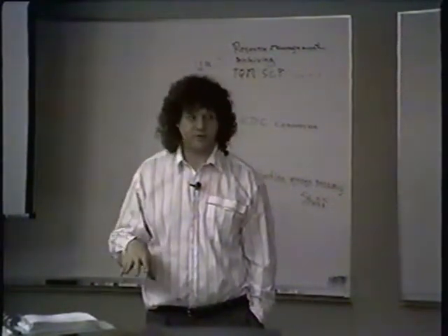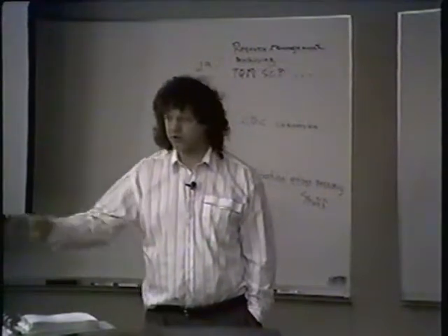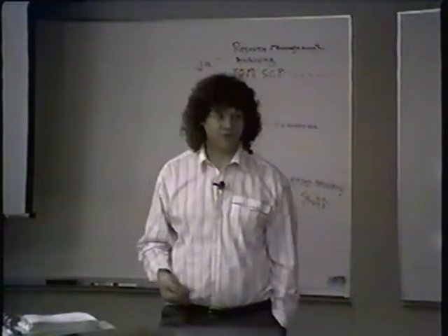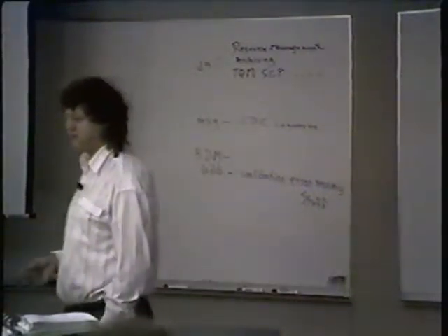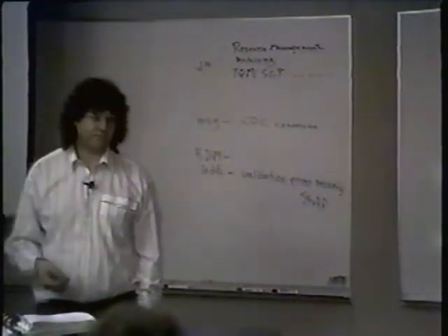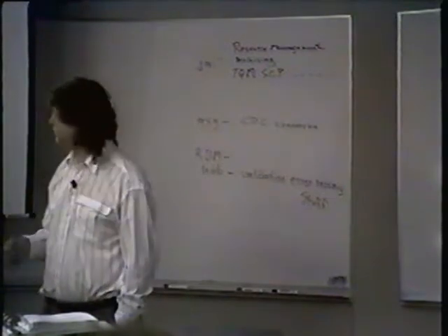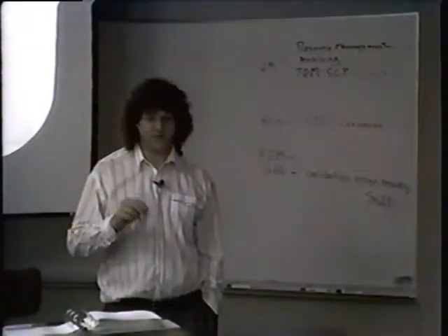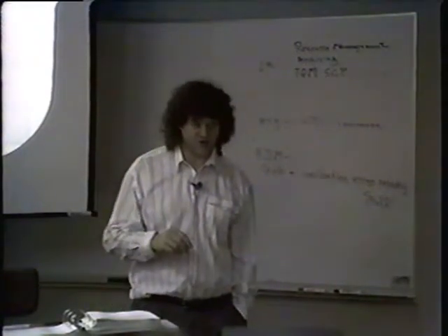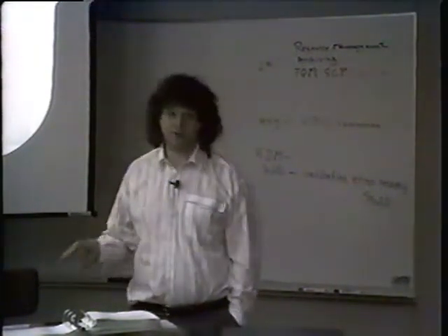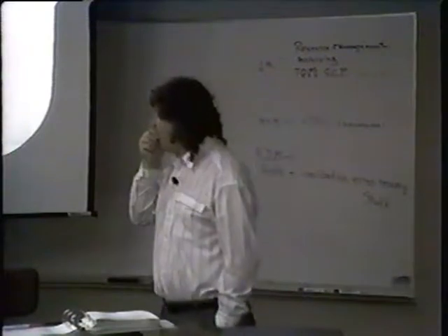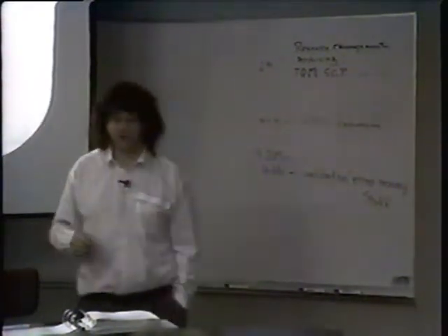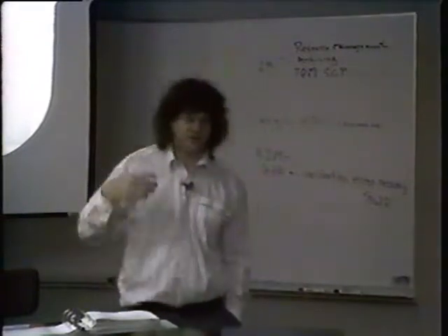Now in the planning guide, we do have sample surveys as something to start with. One goes to the analyst, one goes to the application support people. There's also one in there that goes to the end user. Do you have large procedure libraries? That's another one you're looking for. And you may not have a realistic idea of what's out there. Because at this point, this is where you're determining who's going to be the hot spots in terms of time-consuming code conversion and what people are going to be real easy to deal with.